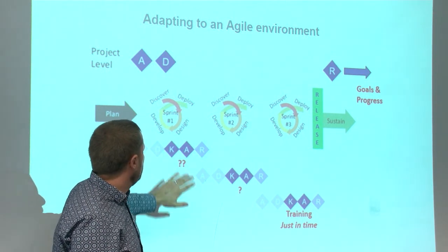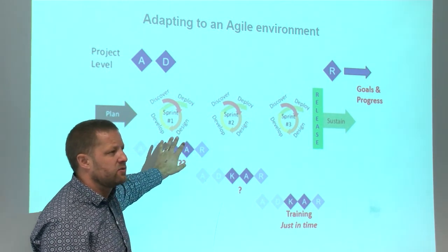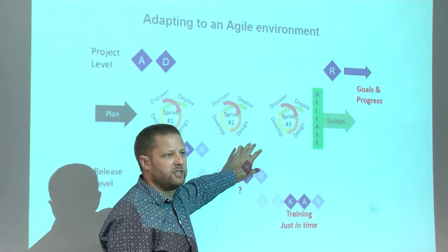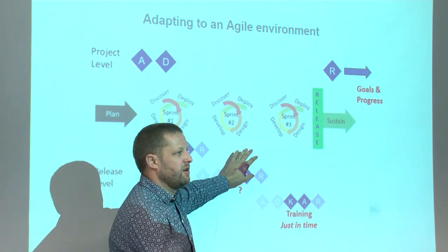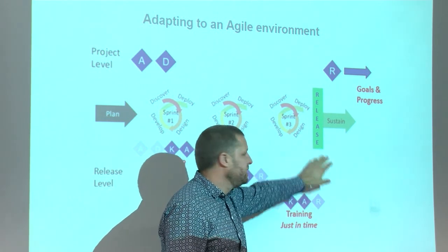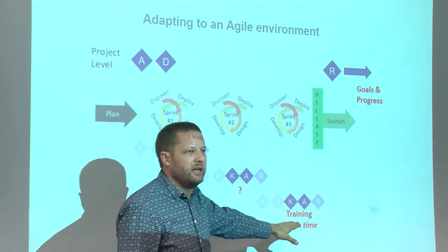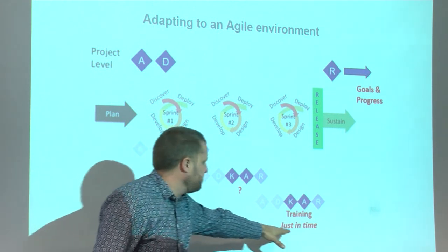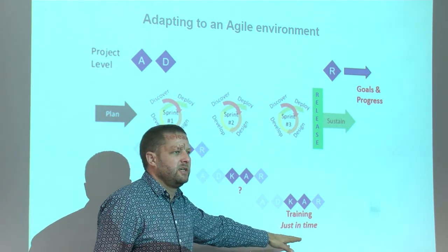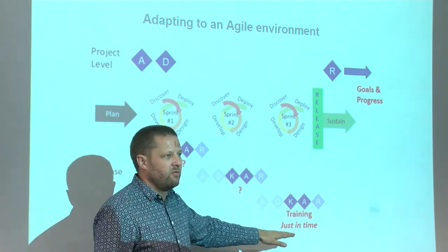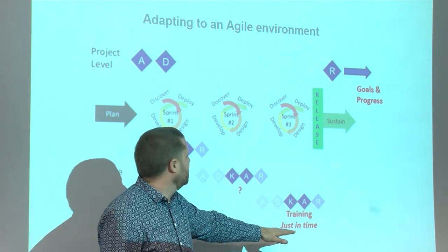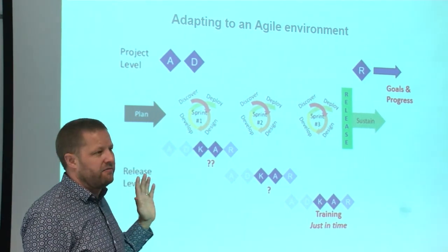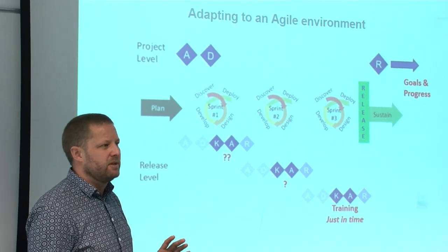So we need to revisit these things with our stakeholders on a much more regular basis as the picture becomes clearer for the change team, as we get nearer to actually releasing. A really good example is our training, and we've already experienced this a number of times in the work we've delivered: it happens right at the last minute because the trainers are getting their content right near the end of the release or right before the release occurs. So it compresses timeframes.